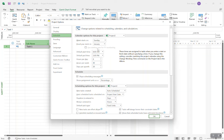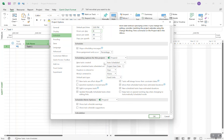Start and finish dates: make sure if you adjust these, they reflect your project calendar. Most companies work with 40 hours a week. An important one: New Task Created — set to Auto Schedule. You can make it so that for all new projects, the default is auto scheduled instead of manually scheduled, so you never have to do that again. In Save, I advise against auto save because it will actually remove your undos — so if you save every time, you can no longer undo.